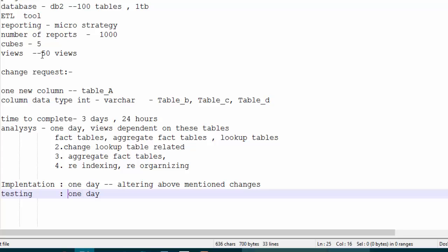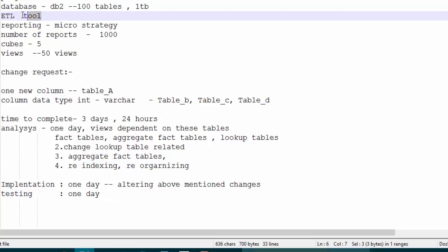But once you become a data modeler or data architect, you have to think of all the stakeholders, from the business perspective and the technical perspective also. DBA, how many changes they have to undergo. Yeah. If they have some batch programs, they have to do it too, right? You forgot one more step. Taking your project, ETL you said, right? ETL mappings will be there. Who will change the mappings? Unless mappings are changed, how will the data be brought? If data is not brought, how will you test? Correct. So that step also you missed. Even ETL guys will need some more time, right?